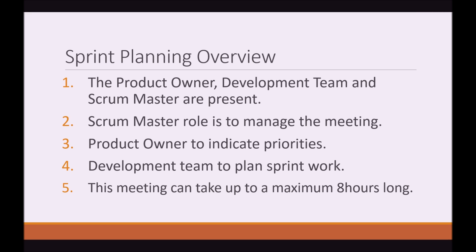Overview of the Sprint Planning Meeting. The people who need to be present in this meeting are the Product Owner, the Development Team, and the Scrum Master. The role of the Scrum Master is to manage the meeting — making sure people aren't talking about irrelevant things and that the meeting keeps moving forward. The role of the Product Owner is to indicate his priorities, and the role of the Development Team is to plan the Sprint's work.